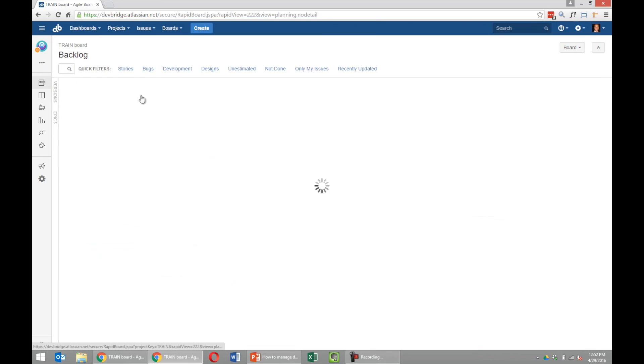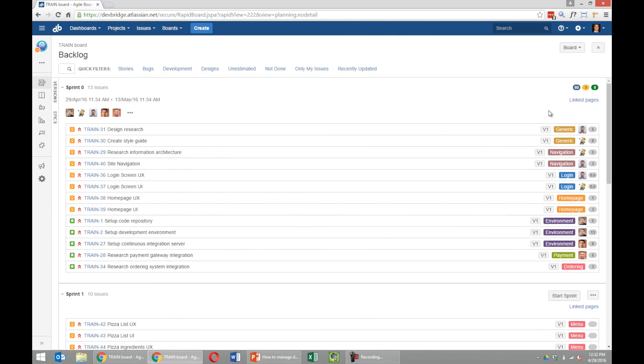That's basically it. There's a few things we're still playing around with, like whether or not we want to estimate stories that are design tasks. Right now we're going to try doing it because otherwise it becomes very difficult knowing how much you can pull in for a given sprint from a design standpoint, and that's essentially why story points are there.